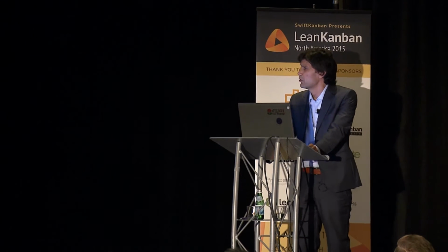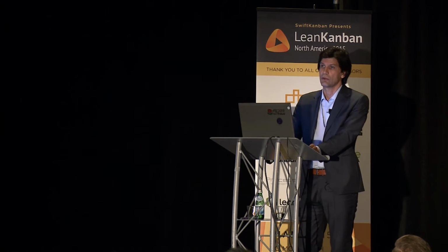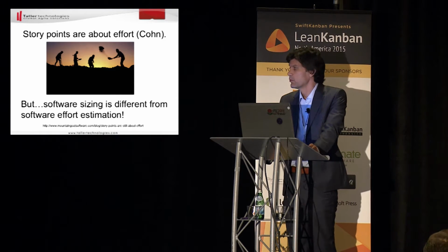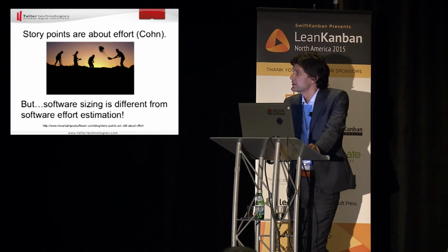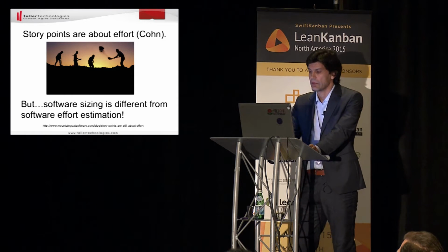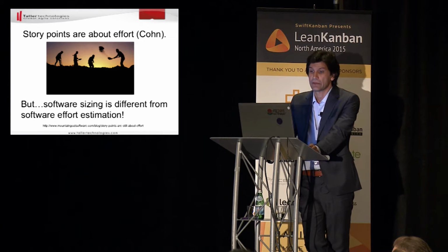We cannot say that the project is 10 smalls, 2 mediums, and 5 larges. Like, we cannot quantify, that's the thing. We can just compare relative sizes. Story points, we can add them, and we can quantify using story points. According to Mike Cohn, and that's my source for this, story points are about effort. It means that story points measure the size in terms of effort. Also, effort is defined as person man-days or man-hours.